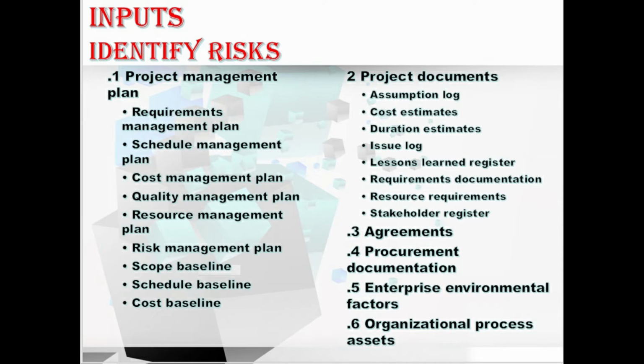We have the project documents. In the project documents, we have the assumption log, cost estimates, duration estimates, issue log, lessons learned register, requirements documentation, resource requirements, and the stakeholder register. Let me explain one by one. Assumption log. In this, the assumptions and constraints recorded in the assumption log may give rise to individual project risk and may also influence the levels of overall project risk.